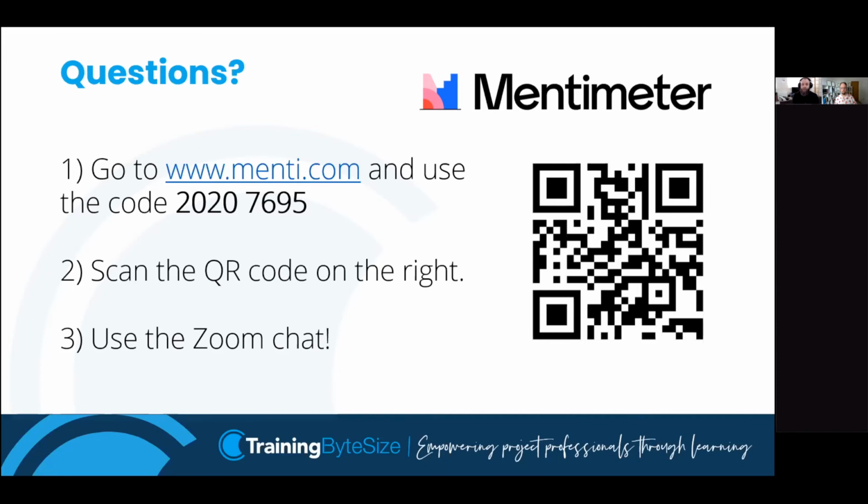If we haven't asked those questions early on and we're halfway through a project, it's going to be very hard to work out how much of this project we have actually earned so far, if we haven't been tracking it. So it doesn't really work if you plug it in halfway through. You tend to have to do it in the formative stages of the project, in the business case and PMP. You have to decide we're going to use earned value management on this project.